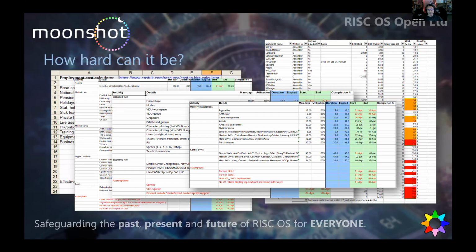So this is an example of the project plans that we created to get to our 2.5 million estimates. What we actually did was we had two people independently take a top-down approach and a bottom-up approach of planning this and thinking, what would it take? And we both came out to within a million or two of each other. The estimate was somewhere between 2 and 5 million. So we plumped for 2.5, but there's good reasons for that, and there's good sound logic.